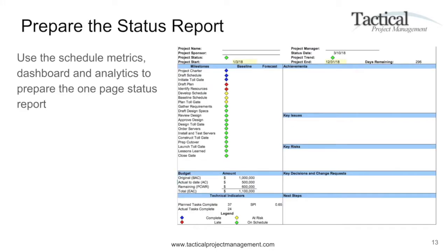The next step is to prepare the status. Now you have objective metrics identified — you're able to track the budget, use technical indicators to determine how many tasks were supposed to be completed versus how many were actually completed, and it calculates a rough scheduled performance index. There's also room for achievements, a summary of key issues and risks, key decisions, change requests, next steps, and a milestone section showing baseline versus forecast to indicate if you're on target or behind.